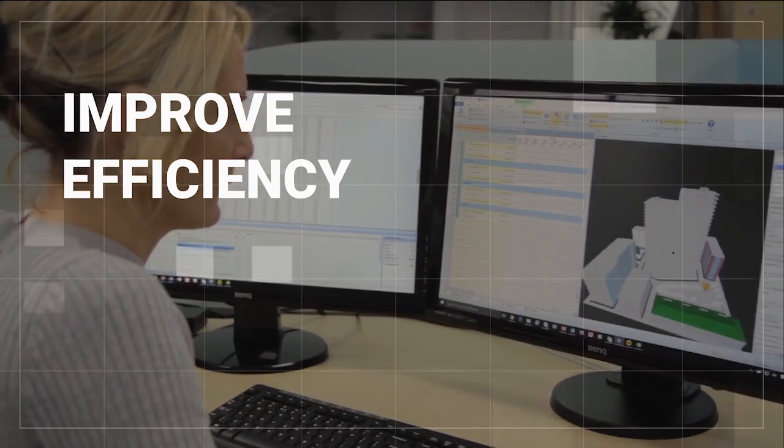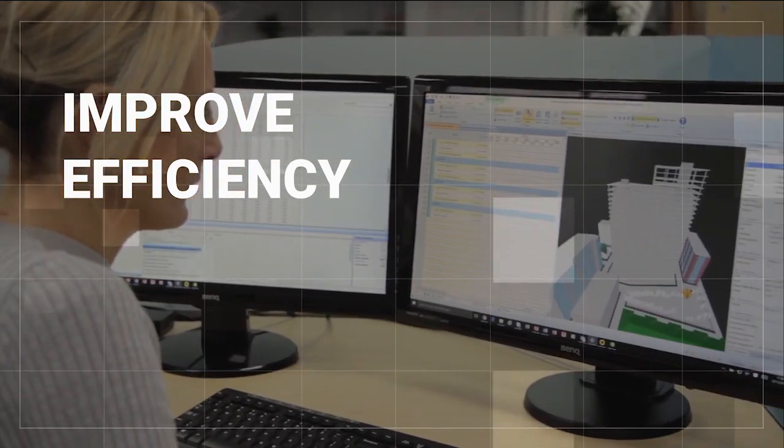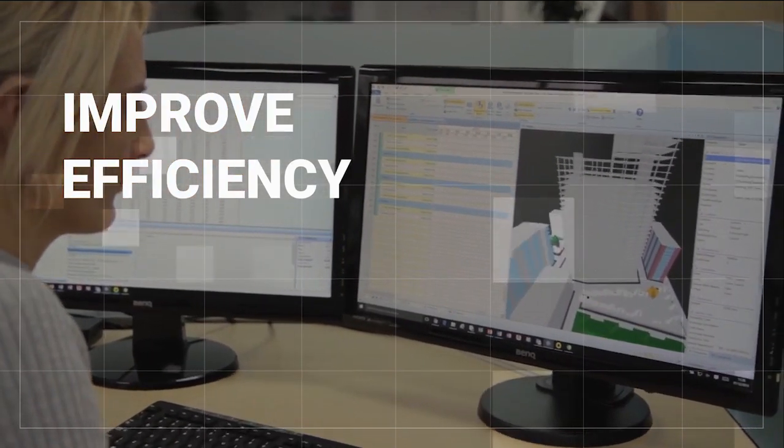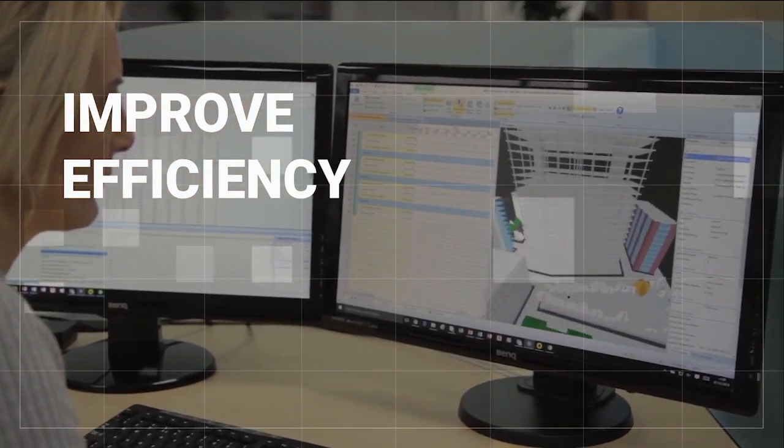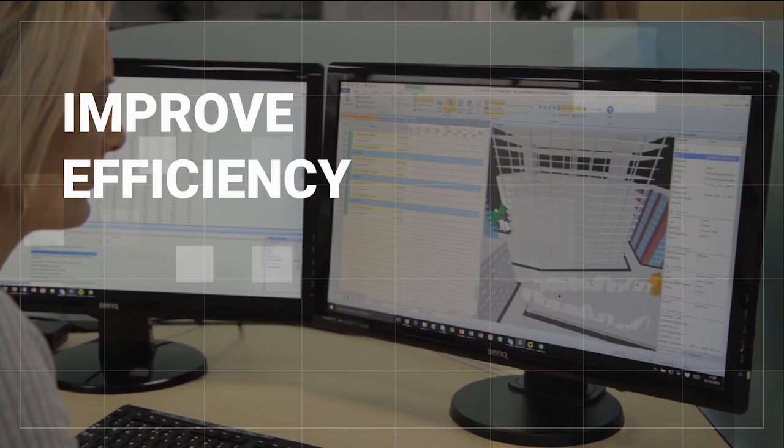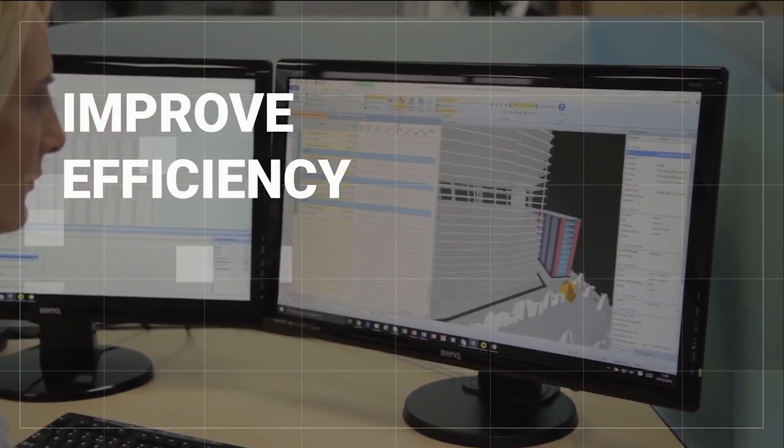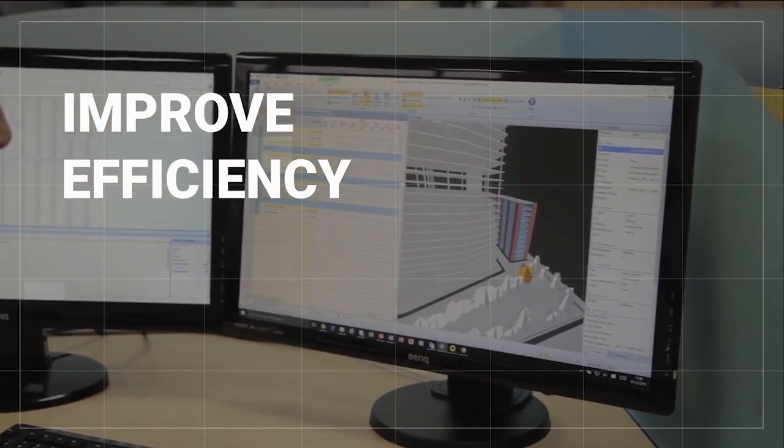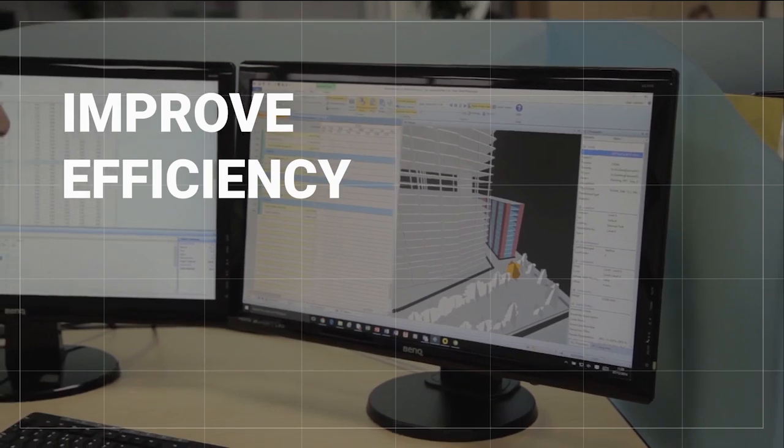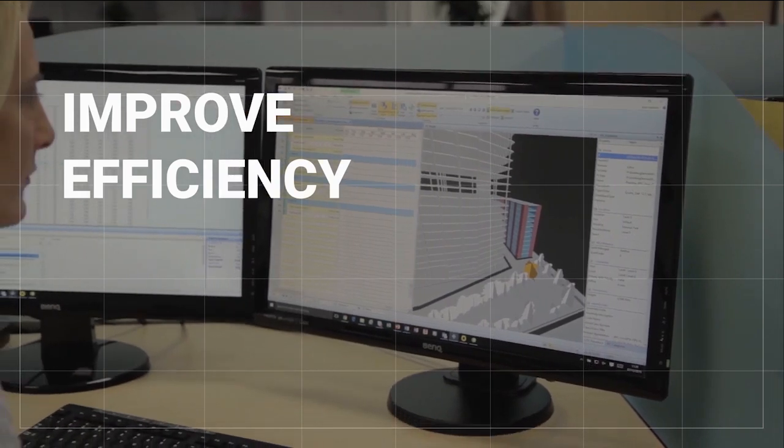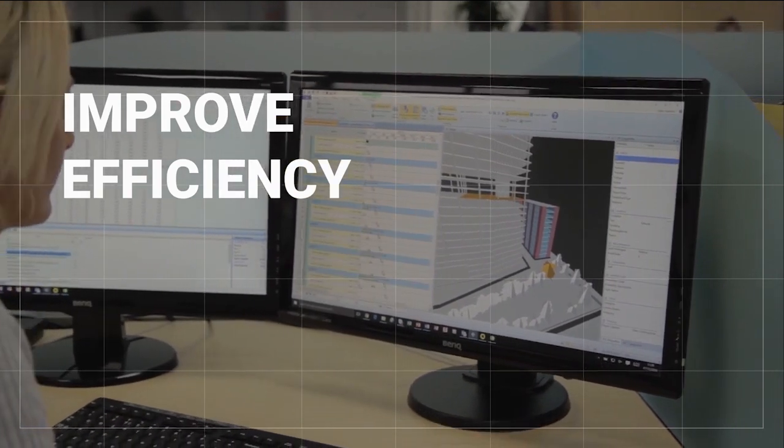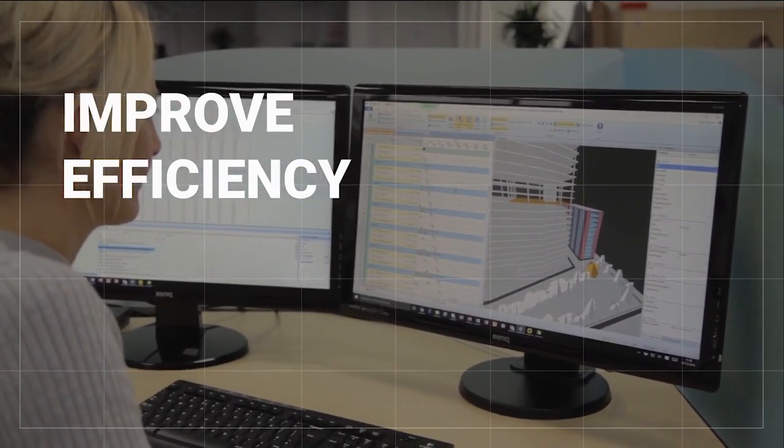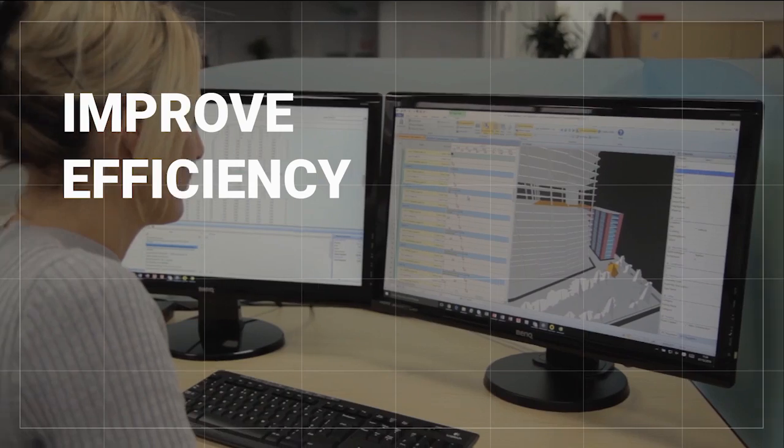Working in 4D with PowerProject BIM reduces the risk of human error and improves your efficiency by allowing you to rehearse a build sequence and compare different scenarios. As the project moves on, it gives you a visual comparison of the current status versus the original plan.